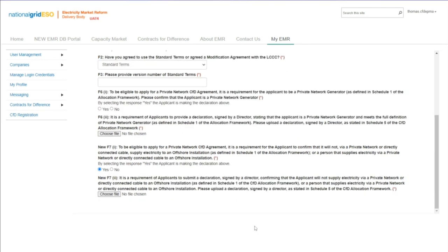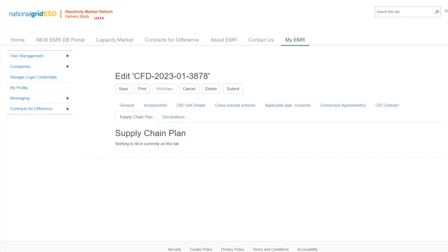Further information on this requirement can be found in the allocation framework and the guidance materials. If the capacity in megawatts entered into the CFD unit details tab is equal to or greater than 300 megawatts, or the technology type is floating offshore wind at any capacity, then the applicants are required to provide the supply chain plan certificate received from the Secretary of State and field G1 will appear. As the capacity for this application is below 300 megawatts, the requirement does not show, and the message 'nothing to fill in currently on this tab' is shown.